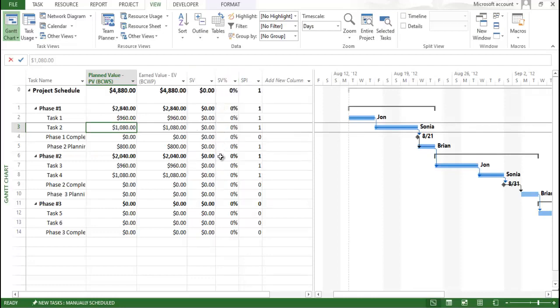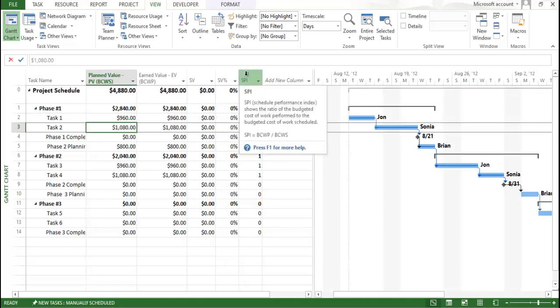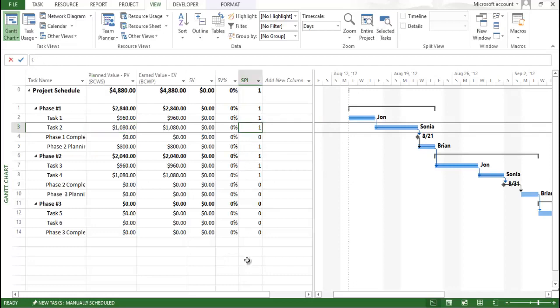If you multiply the schedule variance by 100, you get the percentage schedule variance. The Schedule Performance Index (SPI) shows the ratio of BCWP to BCWS. If this value is 1, your schedule is on time. If this value is negative or less than 1, it means your project is behind schedule — this scenario is considered a time overrun. If it is 1, you are on track.